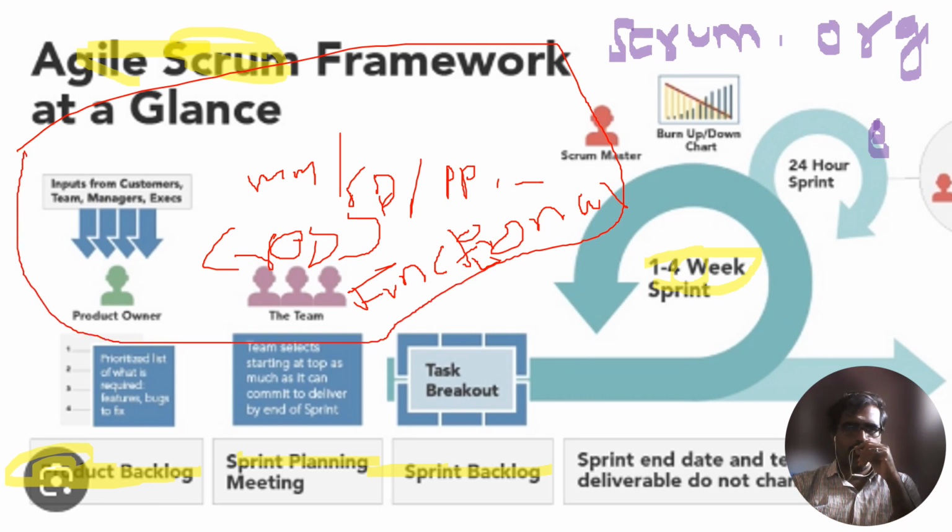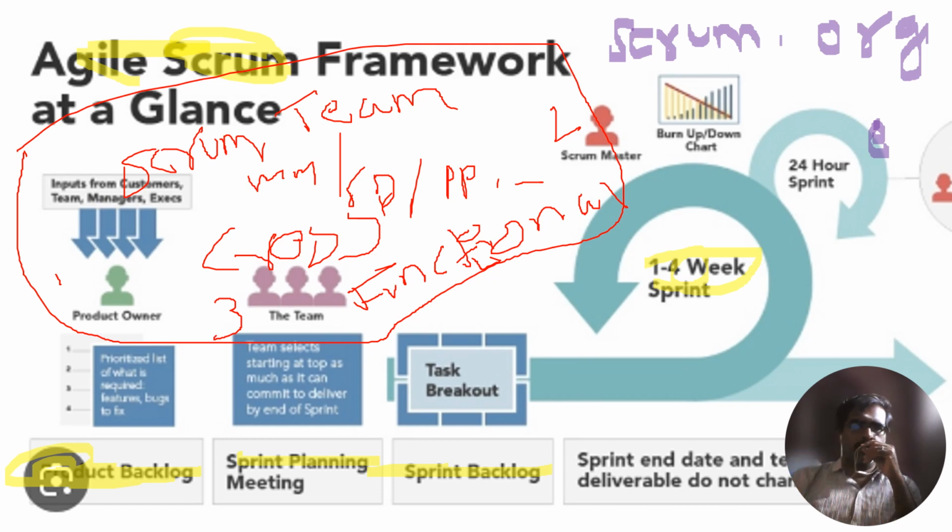Third comes sprint, defined in the Scrum. Say first points, the strategy meeting, that is not defined in the Scrum but often used. Release planning meeting, not defined in the Scrum but often used. Sprint, yes, it is defined in the Scrum. Sprints are time boxed iterations of 1 to 4 weeks, most often done for 2 weeks. They build a potentially releasable product increment.